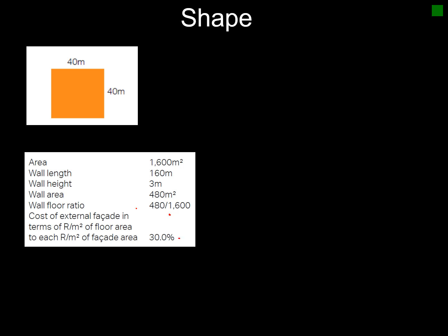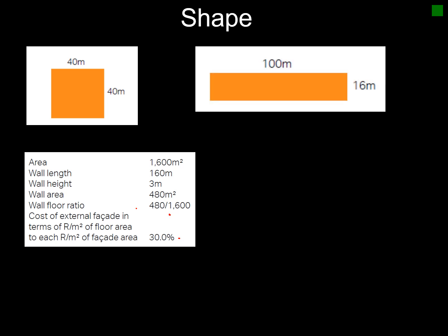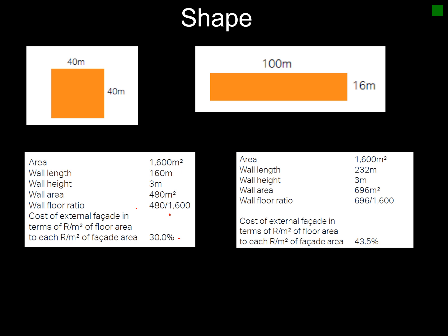Looking at the second scenario, you've got 100 by 16 meters, which is the same area when you calculate it. Your area is the same, but your wall length is now 232 meters. The height still stays the same, and your wall area now goes up to 696 square meters. Dividing that by your floor area gives a cost ratio of 43.5 percent.